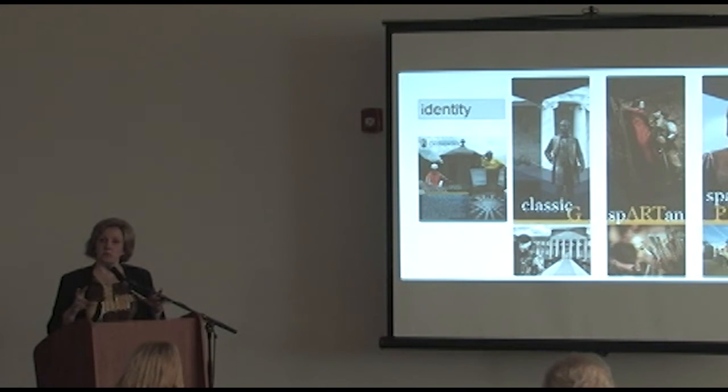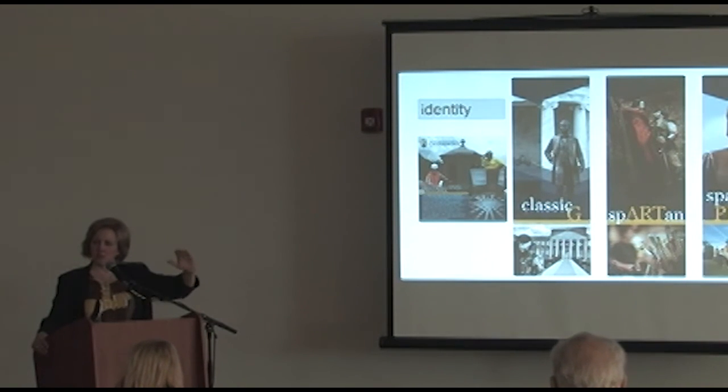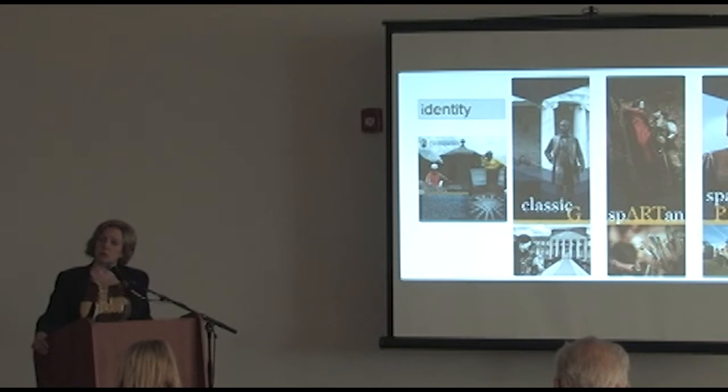That would drive it. If it appeared we were going over budget, then we could do some value engineering during design, not after the fact. And part of my role was to say, but here are the 8 goals we set for the project. So while we make a value engineering choice, if we have to, we still need to maintain the primary goals we set for the project, otherwise your project's not a success. So that helped form the decision making.